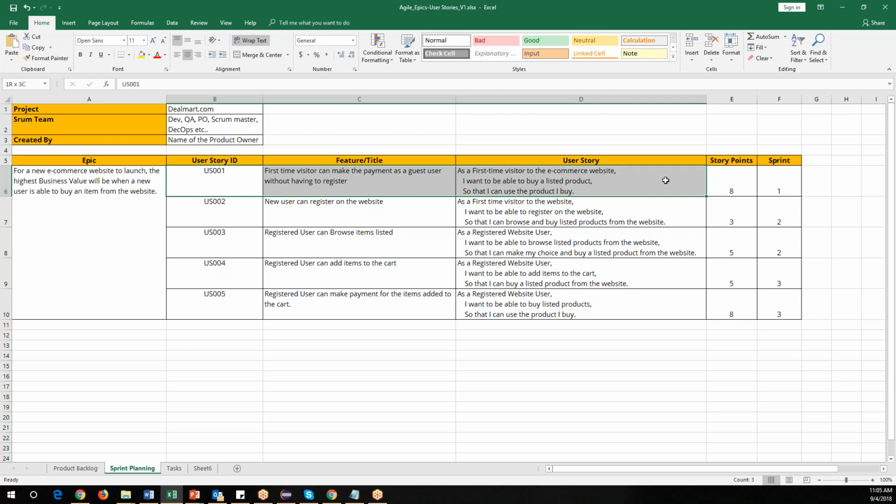So this particular story is planned for one sprint, and the rest of the stories are part of the second sprint, and other stories are part of the third sprint. So like this they will do the sprint planning meeting. They will give an estimation for every story, and they will plan that particular story to that particular sprint.